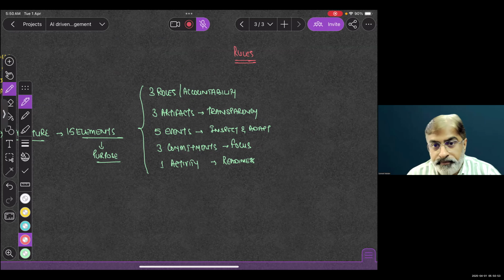It's a rule. Some guidelines are given. Scrum team size, which is product owner, developers plus Scrum master, is 10 or fewer than 10. Daily Scrum happens at the same time, same location every day. Now, this governs some set of rules and guidelines within which your developers develop or use practices in order to deliver a value in the form of an increment. That is why Scrum is called a framework.